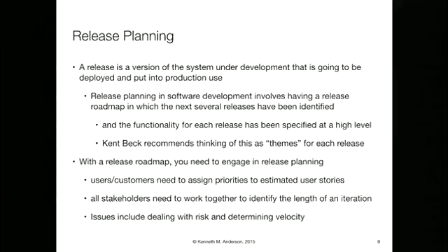That first day of the iteration is always planning and making sure everyone's oriented, and then we run. And that helps if you don't have days in between the iterations to do that type of work. Because Scrum will say at the end of an iteration you have to have time for debriefing. What went right, what didn't go right, etc. And then time for planning. And so that, it's got to come out somewhere. So yes, a day or two.